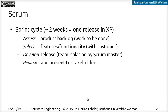This roughly corresponds to one release in extreme programming, so you can easily combine the two. In the assessment phase, the backlog of things to be done is evaluated. Then the team together with the customer selects which features they want to implement in the cycle. Then the actual development happens — here the team is not to be contacted by the customer and the rest. And last but not least, there's a review phase and presentation of the current release to the stakeholders. This is very similar to all the other iterative processes we've talked about.